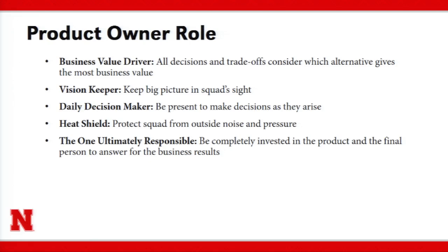If you can imagine, the team times are 8 to 10 hours a week, right? It's not like you and I working Monday through Friday. They may work Monday, Wednesday, Friday. Well, if the question isn't answered on Monday, they're not going to meet again until Wednesday. Then they might not design that till Friday, and then you might not see it till next Monday. If you had a delay in answering their question, can you imagine the cascading effect of that because they're not meeting 40 hours a week like we are?